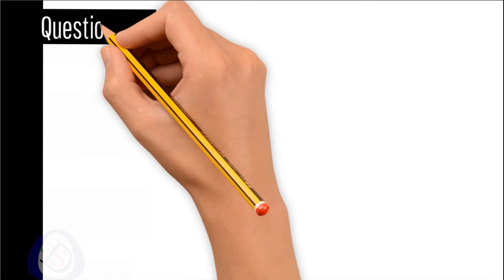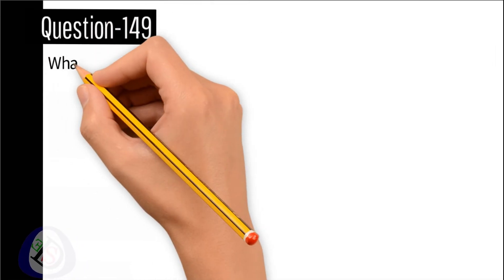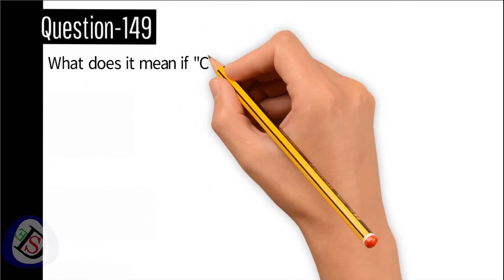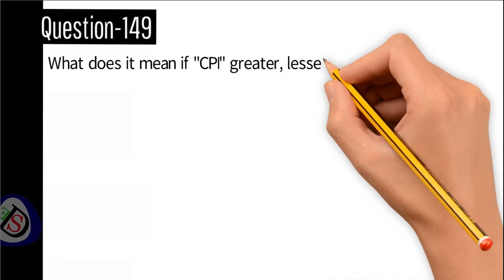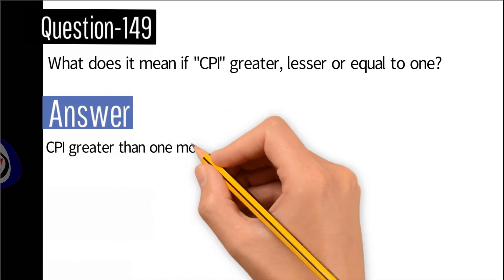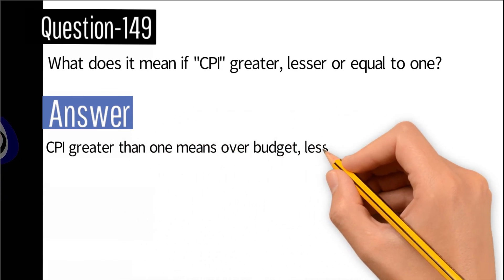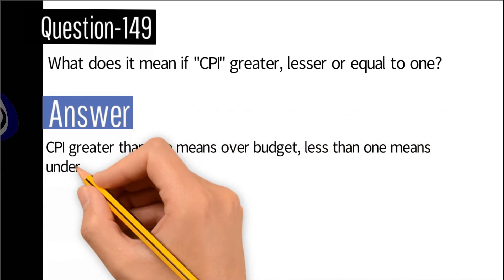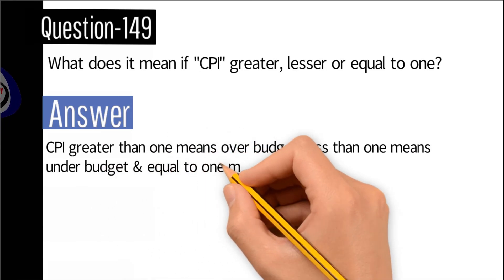Question number 149: What does it mean if CPI is greater, lesser, or equal to 1? Answer: CPI greater than 1 means over budget, less than 1 means under budget, and equal to 1 means same as per budget.